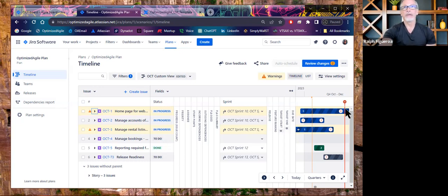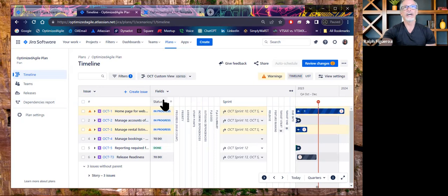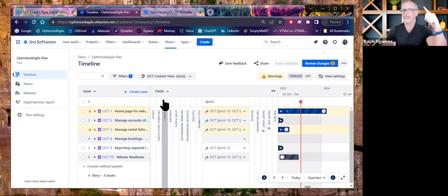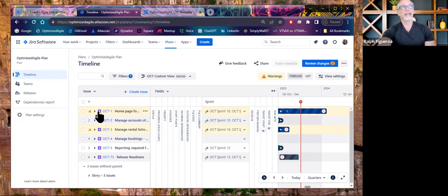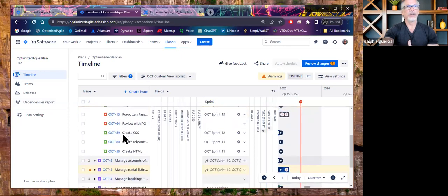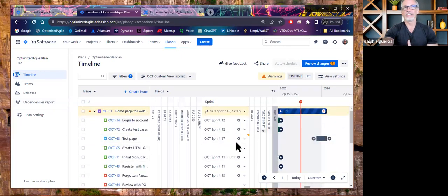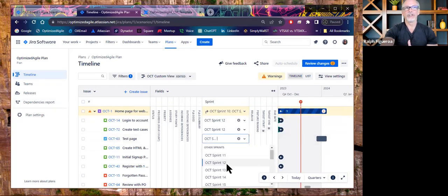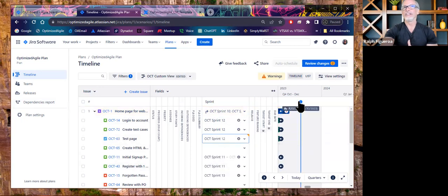And so with Jira Advanced Roadmap, you can actually hone down and root cause which epics are the ones that are exceeding and violating the milestone, therefore turning it red. So that's a risk. And furthermore, you can root cause it to the point of finding the particular issue or issues that are in sprints in this example that are exceeding the milestone. By going up and down, you can see that I only have one issue that's crossing over. And I can either remove it from that sprint or reassign it to an earlier sprint that falls within the milestone timeline.